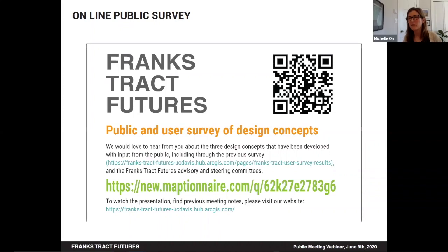Right. Okay. So vibrations carry a long way in this environment, with these kinds of soils. I think that's something we're going to have to think about more. The compaction and vibration parts of the project that I'm familiar with that have come up in our discussions have really been putting posts in to hold silt curtains in place and using vibration to get those into the ground. So we probably have to be a bit more careful about timing for that, for species and for people.